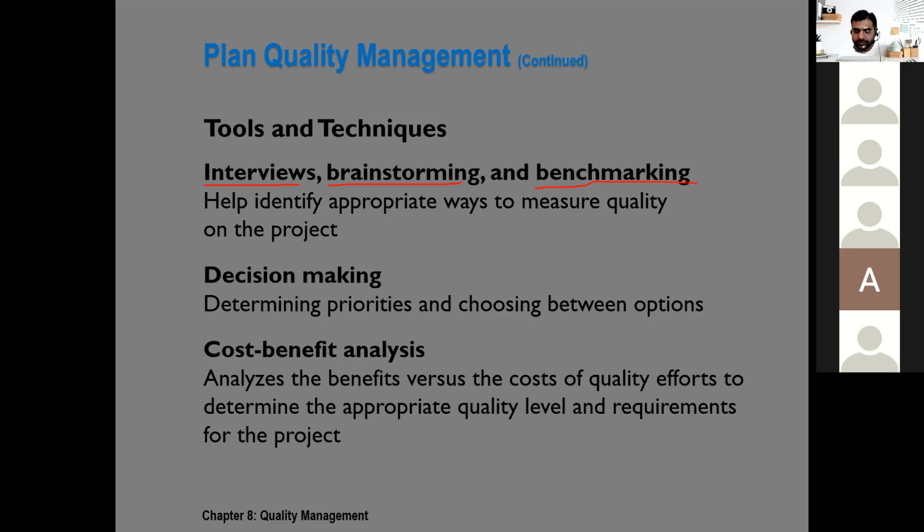We did an exercise on the PMPs, the theoretical maximum productivity of a piece of equipment. We gathered information from the manufacturers, went back over our own data for performance, and compared that with another organization that had similar equipment.